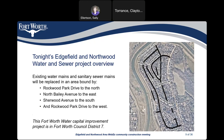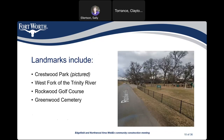Here's another look at the overview of Edgefield and Northwood Water and Sewer Project 103-361. Existing water mains and sanitary sewer mains will be replaced in an area bounded by Rockwood Park Drive to the north, North Bailey Avenue to the east, Sherwood Avenue to the south, and Rockwood Park Drive to the west. This capital improvement project is in Fort Worth Council District 7. Landmarks include Crestwood Park, West Fork, the Trinity River, Rockwood Golf Course, and Greenwood Cemetery.